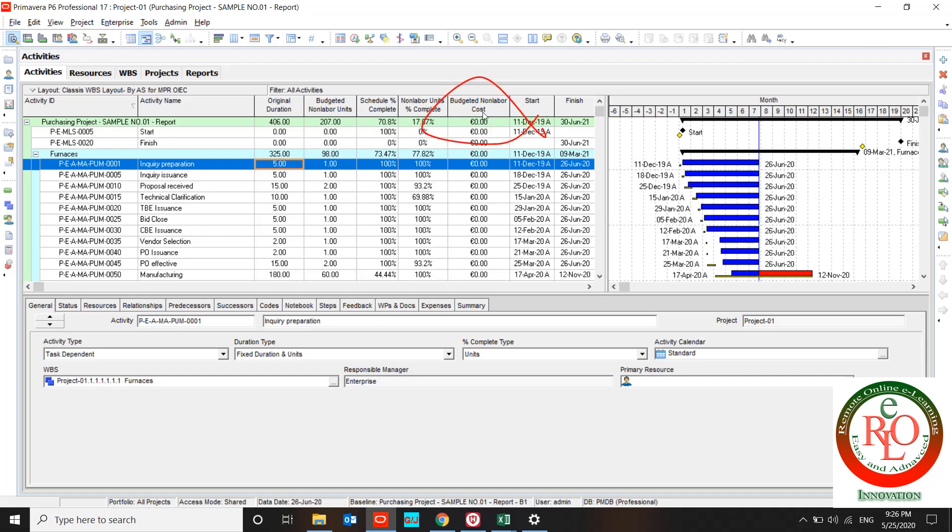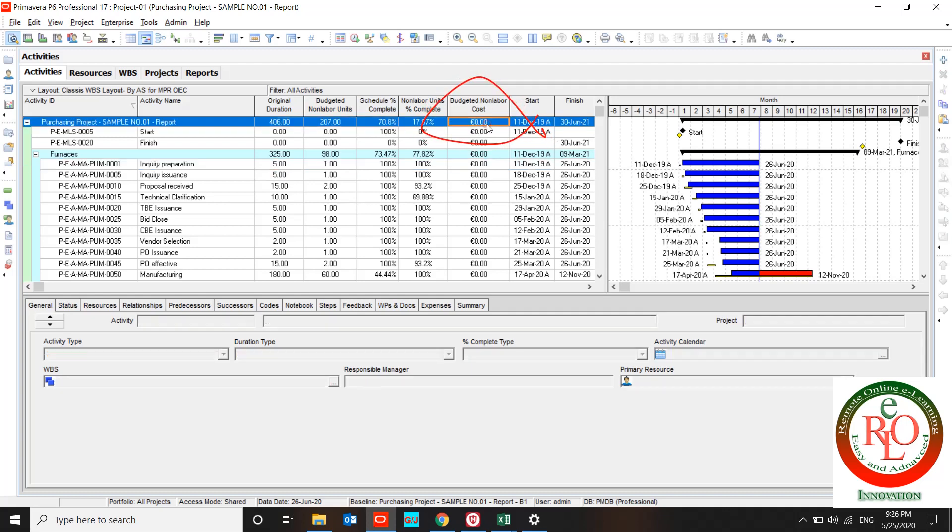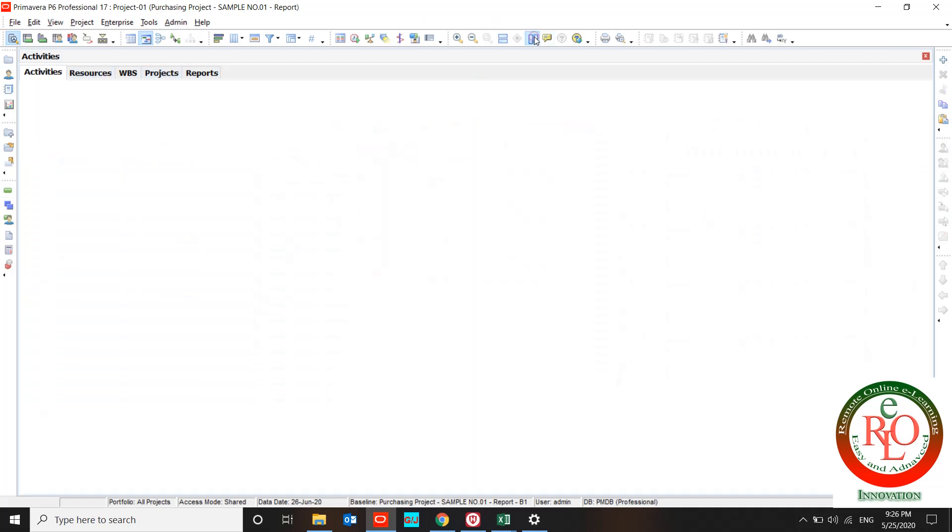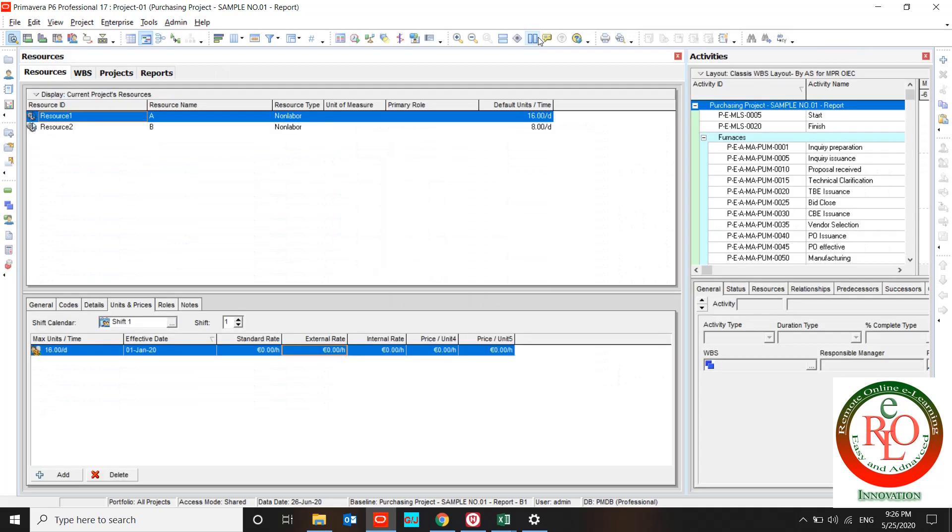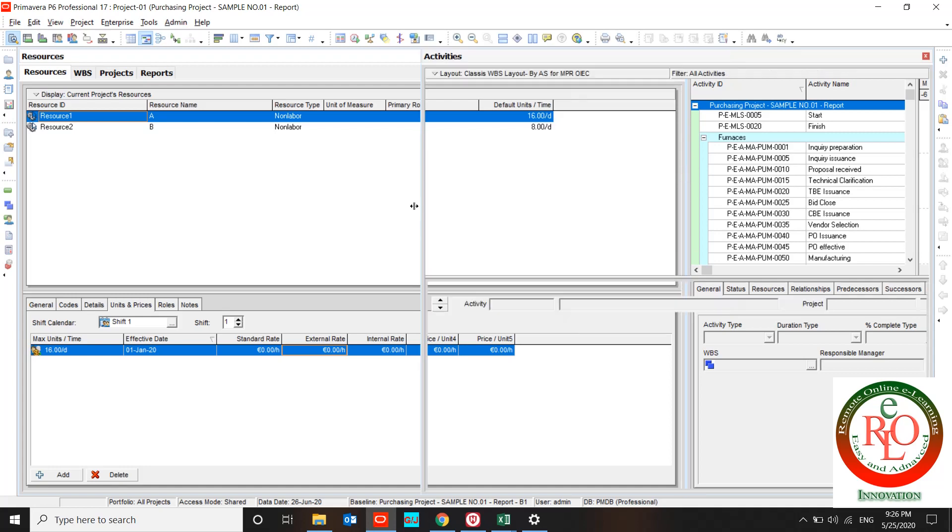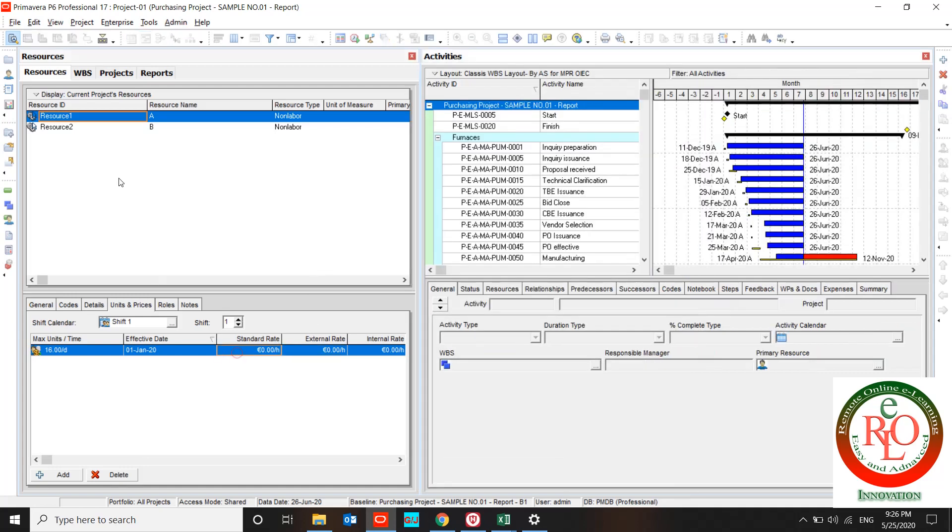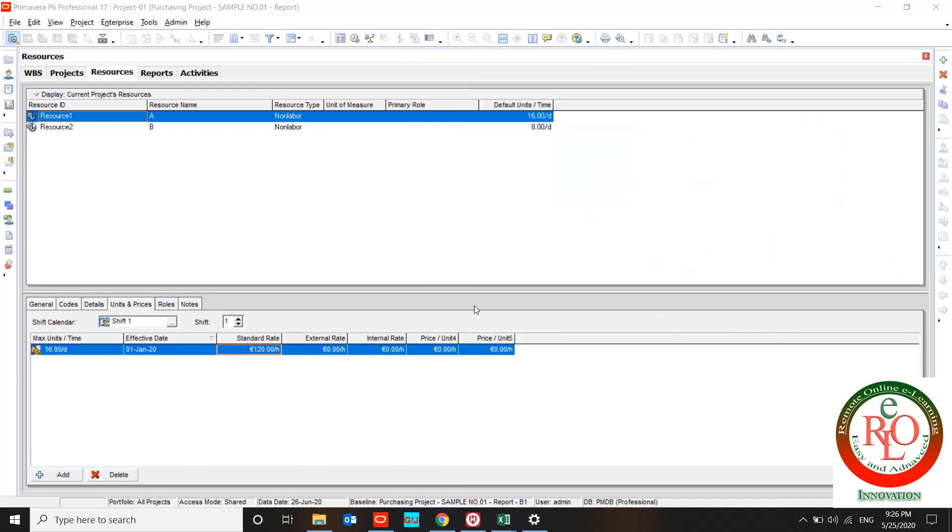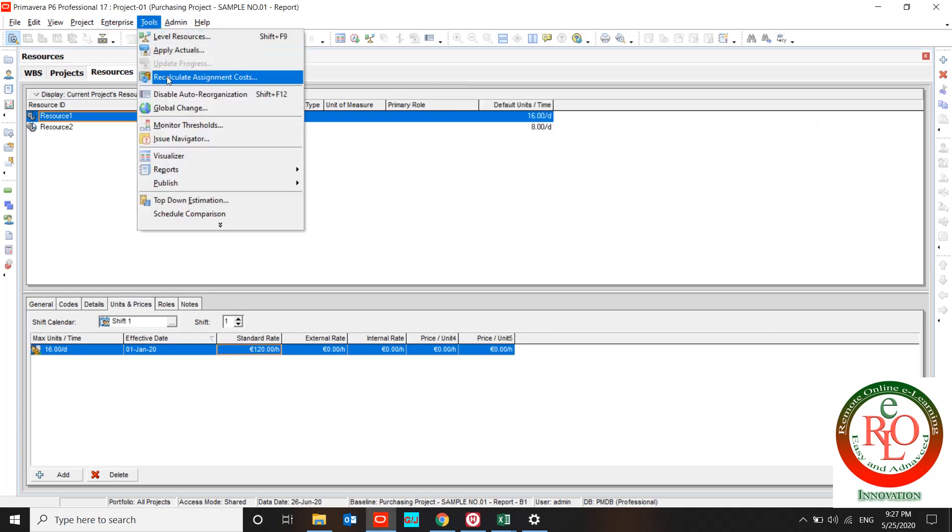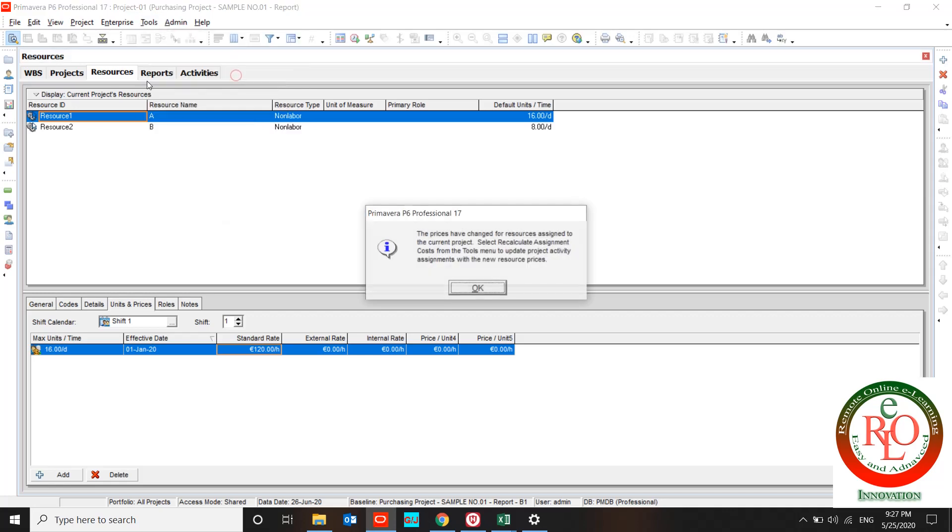Budget non-labor cost is zero. Let me show you. I split the page. Resource A and resource B. Standard rate of resource A is 120, and I recalculate the cost assignment over here.